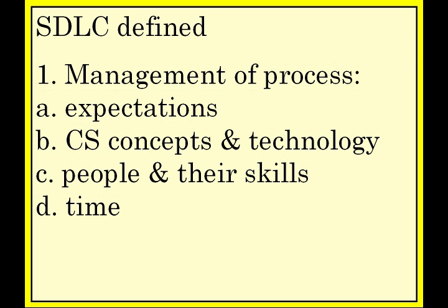You can use the system development life cycle just like your manager can by taking a look at it saying, well, if I'm in phase 2 out of 5 right now, and I've been spending 2/3 of the time already, I wonder if I'm actually going to get through the entire process. So it's a way to help manage that expectation of how much time it's going to take.